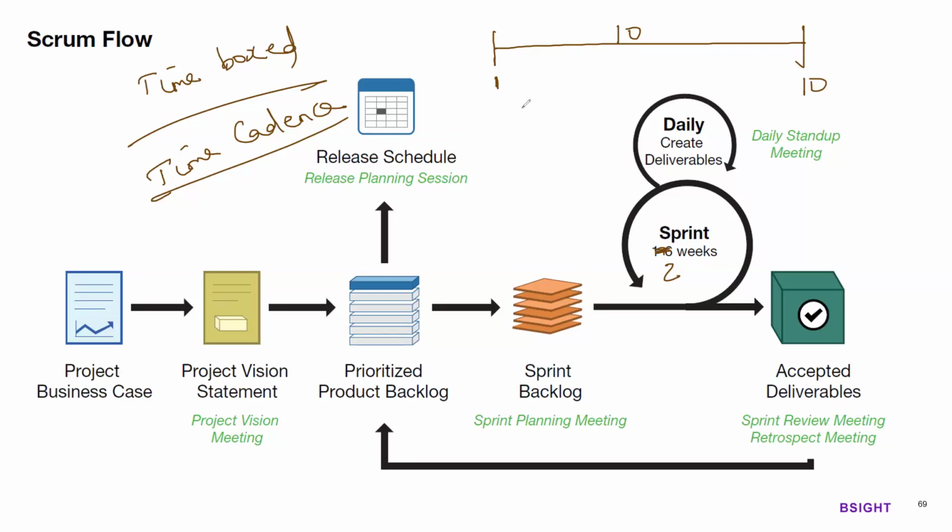On day 1 of the sprint, in the morning, there will be a sprint planning meeting. We're going to talk about 4 meetings: the sprint planning meeting, daily stand-up meeting, sprint review meeting, and sprint retrospective meeting. First, we will talk about the sprint planning meeting. Usually, for a 1-week sprint, the duration of the sprint planning meeting will be 1 hour. So for 2 weeks, it will be 2 hours maximum, which is also time boxed. You can finish early, but it won't go later than that.